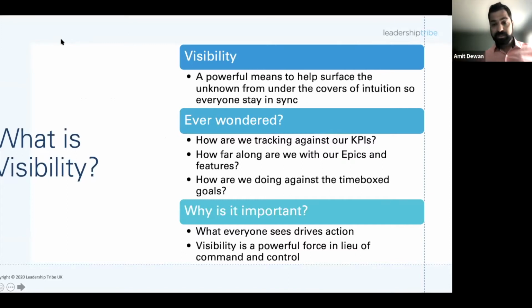Are we 50% through work-wise, or velocity-wise, or story point-wise, versus 50% through on the duration? Then sure, you're on track. But if it's all intuition, not data, nothing real that supports that intuition, then we have a problem, and we want to fix that. There are multiple ways to fix that, but you want to bring some real data to support the findings.